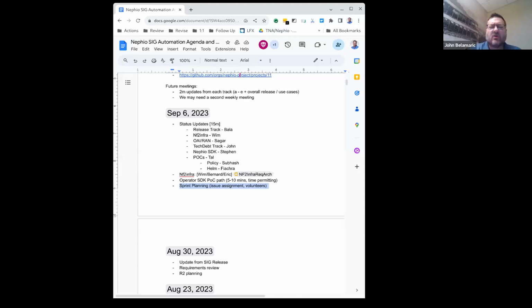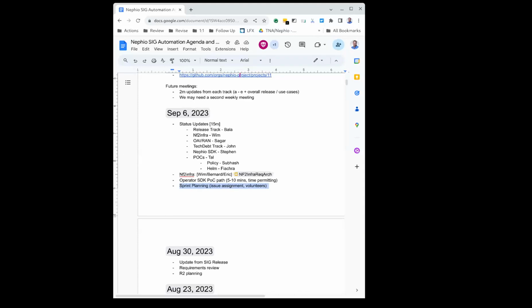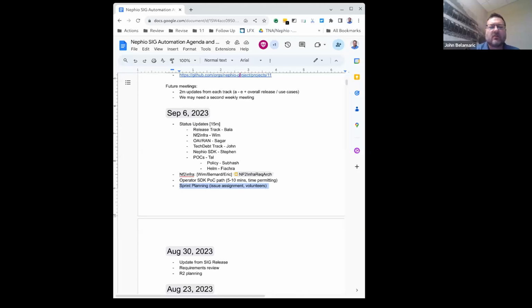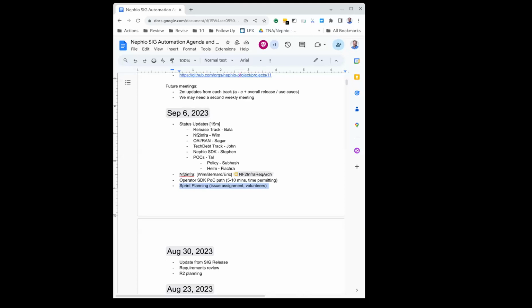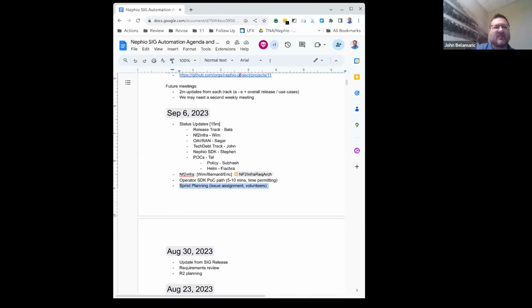So did we start a sprint already? I think we need to do a sprint planning, like you're saying, but what is the sprint schedule? Do we have that laid out? So I had created a first sprint, but the thing is, we were not sprinting. I was thinking let's sprint from this week, create a first sprint from this Monday, so that we can have 2 week sprints from Monday to Friday. I know we lost 2 days, so it's okay. Because he had already created a sprint and the sprint board, but we were not tracking. Exactly, we haven't really kicked it off.